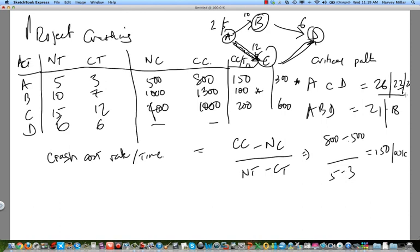And so the best that we can do with this little project is to crash it down to, so the new completion time is twenty weeks or days. And the cost for us was six hundred plus three hundred dollars, so nine hundred dollars. So that's the essence of crashing right there.